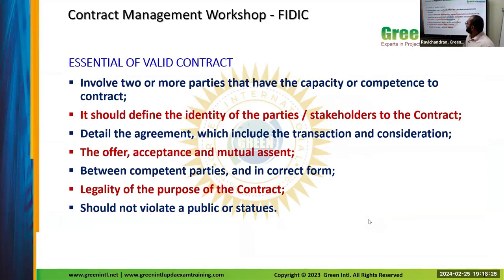Then there should be details of the agreement, like the details about the transaction and the consideration. When we say consideration, it is the money for the seller, and for the buyer, it will be in the form of some work or service. And it should have the offer, acceptance, and mutual assent.